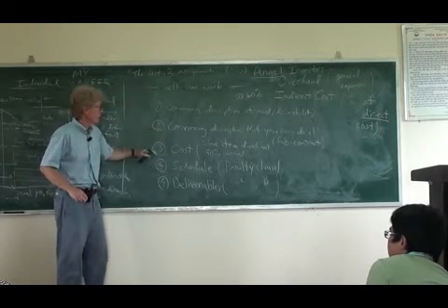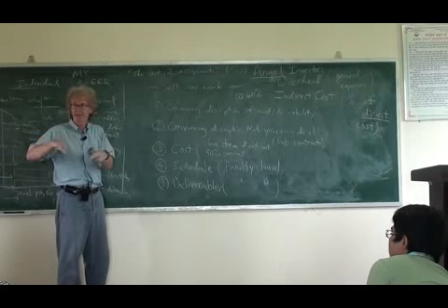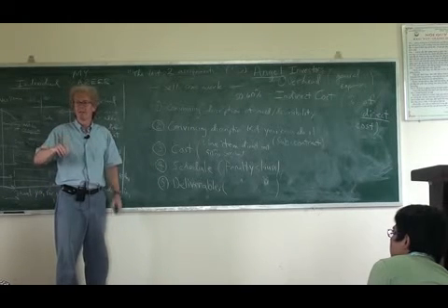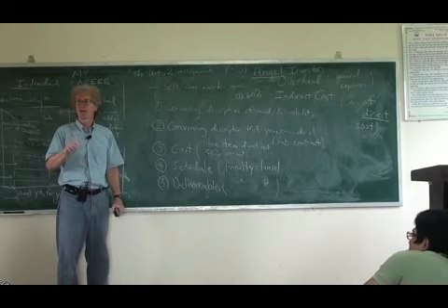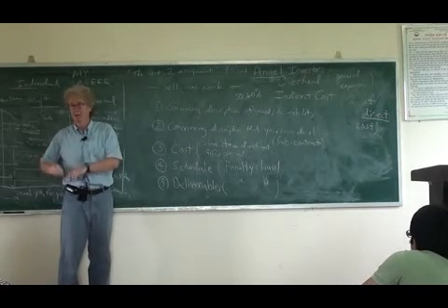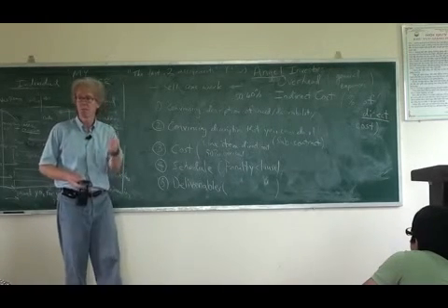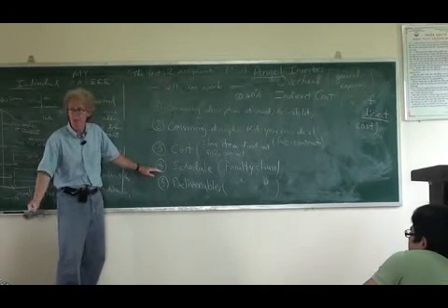And then cost will be a line item. That'll be like a table, maybe something like a half a page. The schedule will also be a table. You know, we propose to begin the project on September 1st. By October 1st, we will have blah, blah, blah. By November 1st, some schedule like that. It doesn't have to be every month. It could be 6 months from now, we're going to have this. But whatever the schedule was, this is how we're going to finish it.